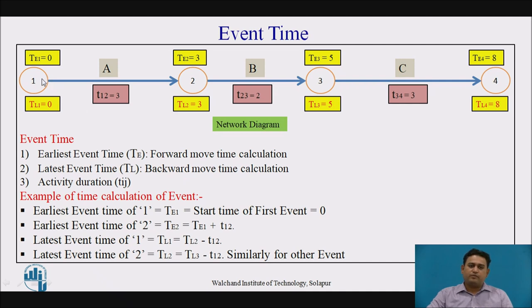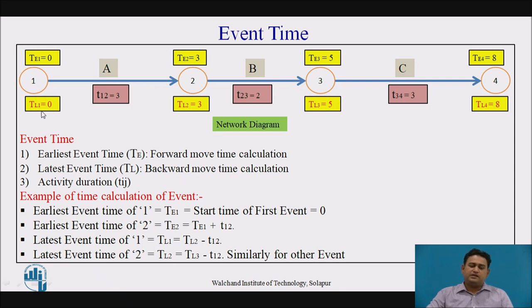Forward moving means from left hand side to right hand side. We move from the left hand side to the right hand side for the earliest event time, and from the right hand side to the left hand side for the latest event time calculations. TL1 is the latest time of event 1, and TL2 is the latest time of event 2.